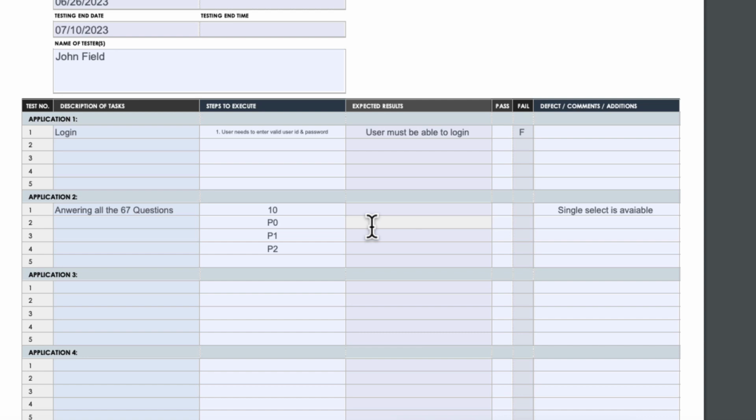P0 means it's critical. Critical means multiple users are being affected once we go live, I'm saying this in production. If multiple users are affected, then it is P0. The customers will call the support team, and the support team will be calling you, either through email or through some on-call agent. So many users are calling and saying they are not able to log in to that particular application. Then it is P0, that is highly critical. We have to fix that as soon as possible.